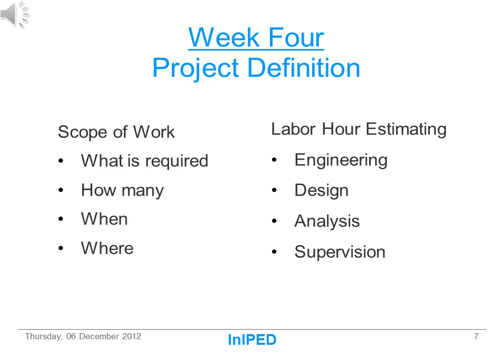Week 4: Project Definition. Defining a project in a written scope of work is one of the first and most important documents the PEL will create. It describes what the project consists of, what will be done, and what deliverables are required. This document forms a foundation for everything the piping department will and will not do, and must receive written approval from both project management and the client. The next step is the piping group's home office man hour estimate. This course will introduce tools and methods intended to make the man hour estimating process easy, helping the PEL and group supervisors manage activities and tasks defined in the scope of work.